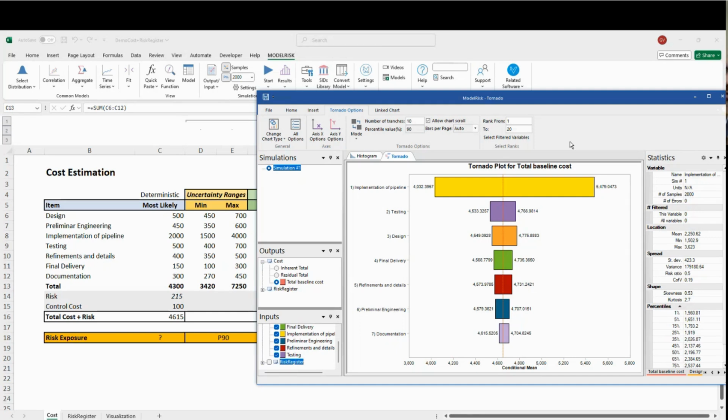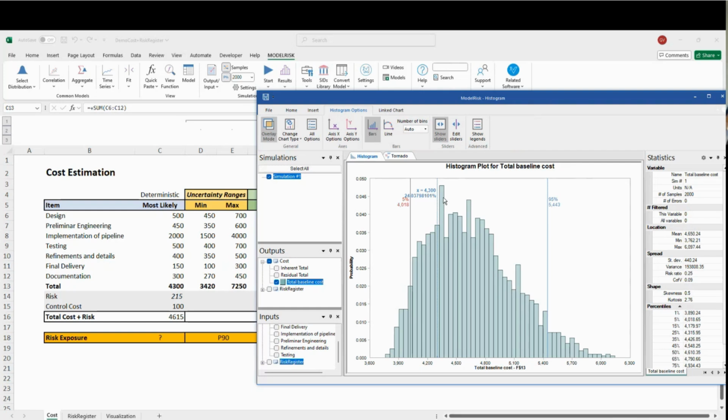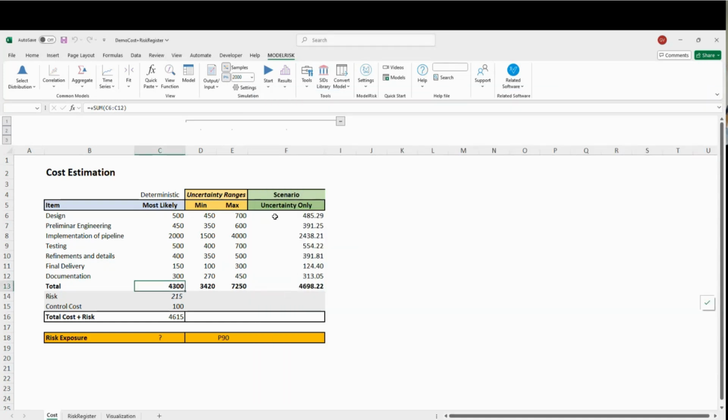And this is going to do some things for you. As I said before, this is going to generate focus. So maybe you will focus on these 3 activities and change them somehow, right? Maybe you will find a different provider. Maybe you will find a different way of doing things, change contracts, etc. So you don't have such a big risk. And maybe the histogram here is not 24%, but hopefully, I don't know, 50 or 60%. So you have more probability in your favor, right? So this is the first portion of the model, right? It's uncertainty only. Remember, it's the first triangle.